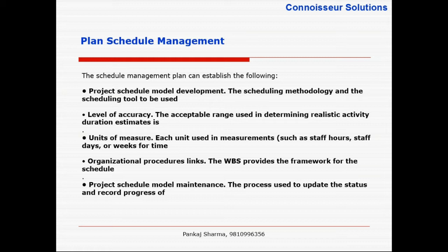See, what I'm trying to say is, if the migration takes 2 days, divide this activity into sub-activities. For example, the prep work can be a separate activity, and the migration can be a separate activity. Try to divide an activity. For example, if I have a wall to be painted and it takes 2 days, it's better to divide the wall into two halves and say one half will be painted on one day and the other section on the next day. Okay, makes sense. Like that we do in the Gantt chart. We keep dividing the activity into granular parts.